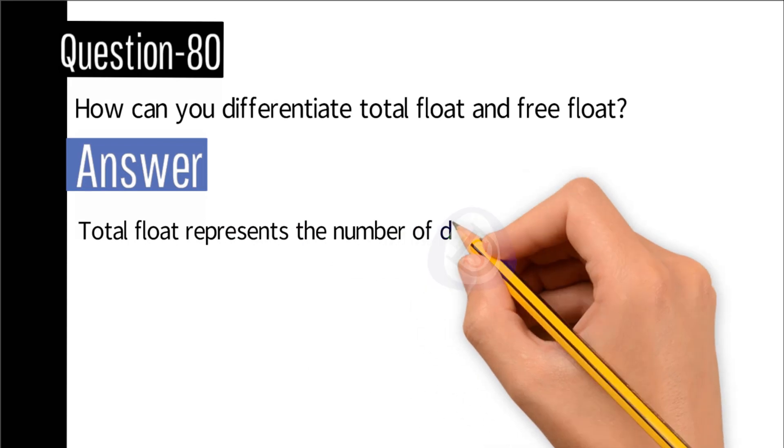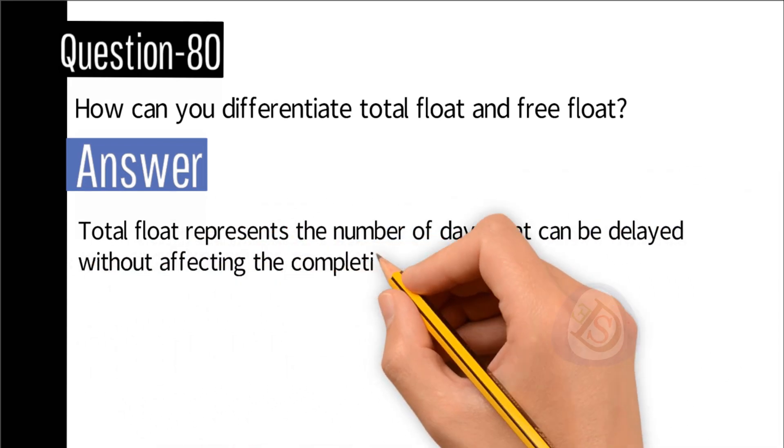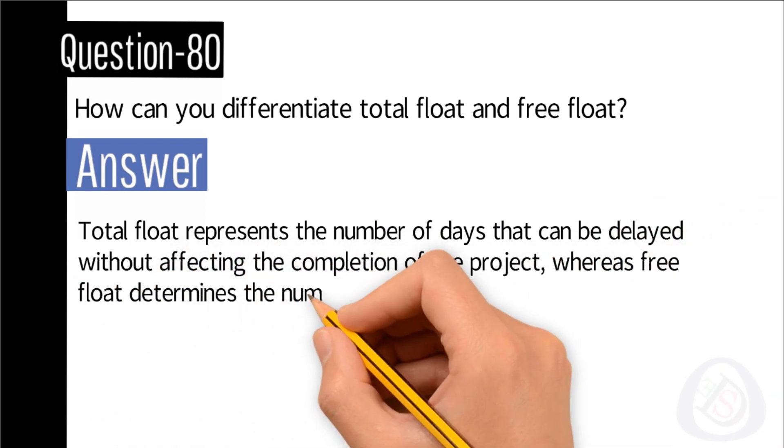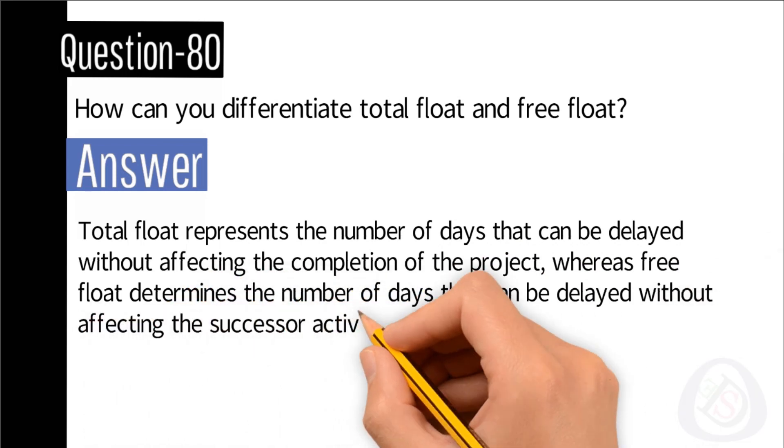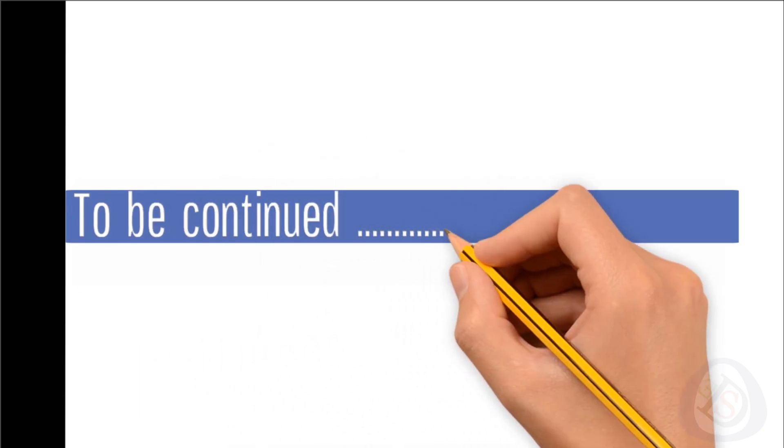Question number 80: How can you differentiate total float and free float? Answer: Total float represents the number of days that can be delayed without affecting the completion of the project, whereas free float determines the number of days that can be delayed without affecting the successor activities.